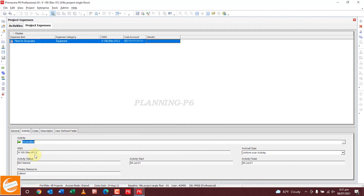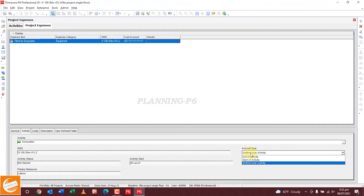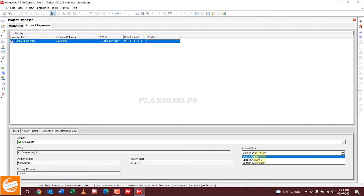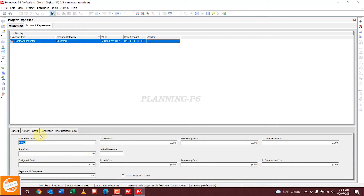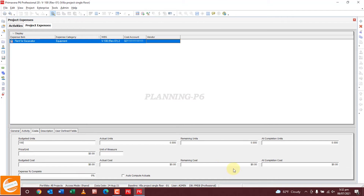You can see the primary resources and everything assigned. You don't need to change here unless you want to. We will set the timing at the end of the activity — change this. Then set the accrual type. Go to the Costs tab. In Costs you can see budgeted units set to zero, and actual units — update this activity and it will update automatically. If you want to write manually, you can do that as well.